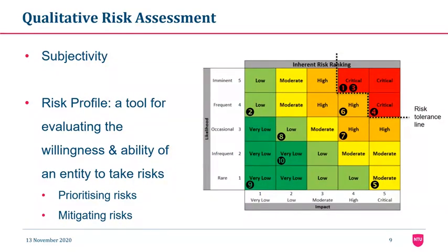There are a number of techniques for estimating risks. Some of them are qualitative and subjective. The others are quantitative and more objective. To rank risks using the qualitative risk assessment method, we usually multiply the likelihood of each risk by its impact, and then we calculate the result and order the risks based on this score.